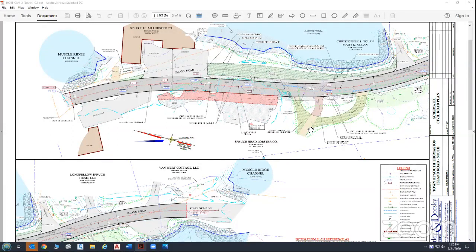So as long as we specify or indicate that we need to maintain accessibility through there at all times for both emergency vehicles and regular travel, both at night and through the day, that we can do. And even if they have to put in a set of lights for flagging at night, so they don't have to have somebody there, then we can incorporate that into this project. That's usually where you see a lot of those light systems. They're becoming a lot more readily available. You wheel in those light systems that do the automatic timing and flagging for you.